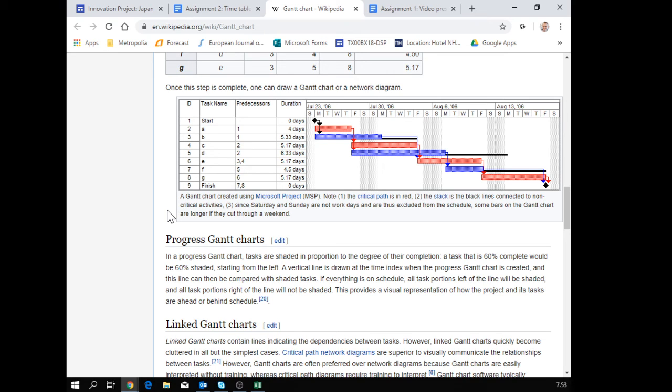How many loops do you think you need after the prototype? Then the final design, and the usage test. Somewhere in between you should have the first version of the box, meaning cardboard and duct tape. You can do a lot with cardboard and duct tape. This is engineering, you know. Then 3D printing the final box.